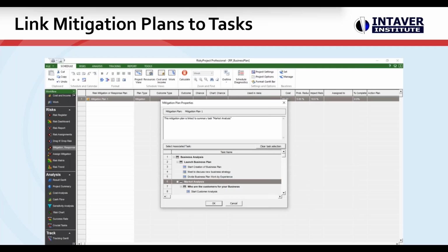So all of the data, including planned and actuals, will be linked to your mitigation plan automatically, and will be updated as you move through your projects. If you have a planned date for that risk burn down activity to occur, and it slips because the whole schedule is slipping, that will be reflected in your risk mitigation actuals, and you'll be able to chart that.